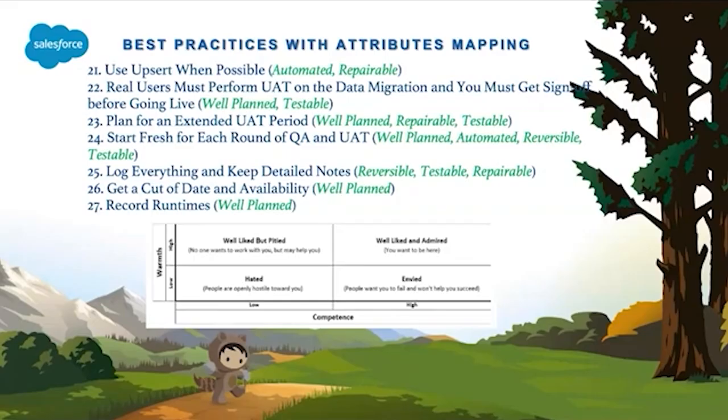to be replicated in full copy as well, because based on your data migration, you may be passing that information for reporting purposes onto any other utilities as part of your nightly job or any other interfaces. It is always advisable to validate those as well after your migration. Your end-to-end, that includes your external migration or anything else involved, will be validated by your power users and you get the sign-off from them before going live.